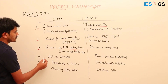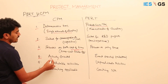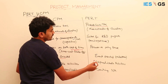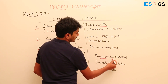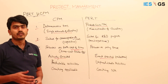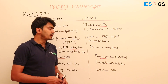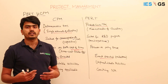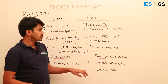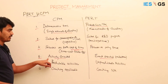The fourth difference: CPM is activity oriented whereas PERT is event oriented. In R&D projects, each milestone gives more visibility into what the next activities will be, making PERT more event oriented, whereas CPM is activity oriented.